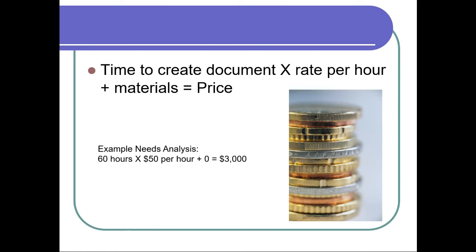So here's a really simple example, right? We want time to create the document or the storyboard or the interface, times the rate per hour, plus any associated materials that might be involved. Again, there's not a whole lot usually in instructional design, but if you're preparing instructor-led training, you might have workbooks and you might have facilitator guides and binders.